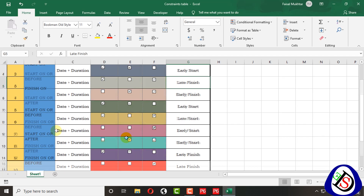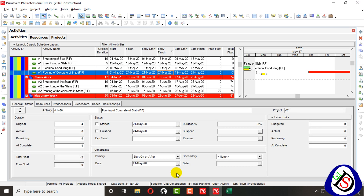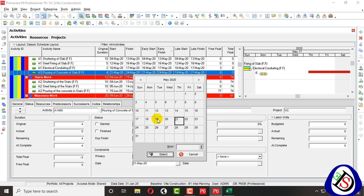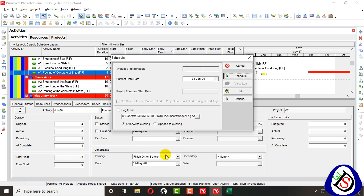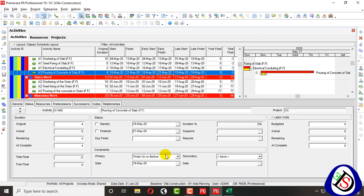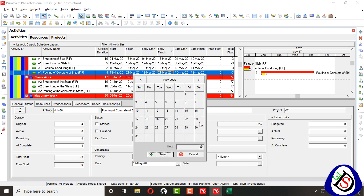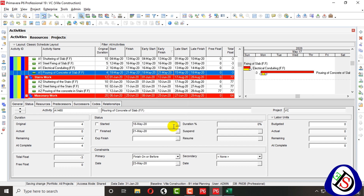The next constraint is Finish On or Before — same behavior pattern. When I deduct two days, applying 19 May, and schedule it, only Late Finish is affected. You can see only Late Finish changes — no Early Finish and no general project finish. When I go two days above to 23 May and schedule it, there is no effect at all — not Late Finish, Early Finish, or general project finish.